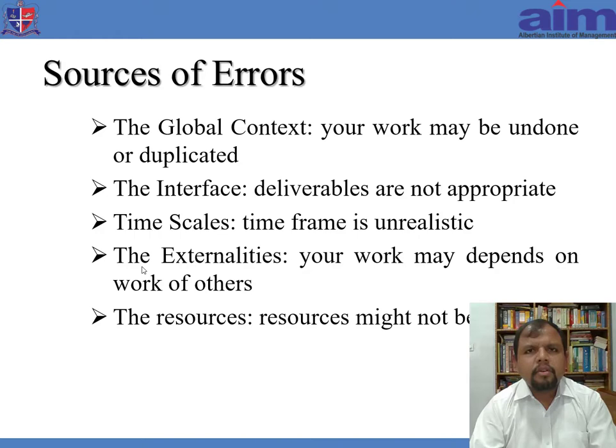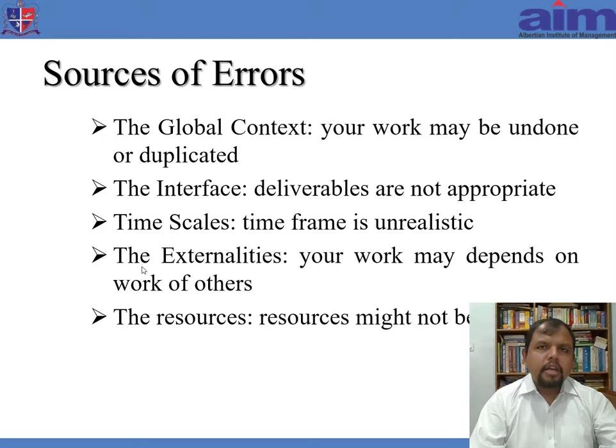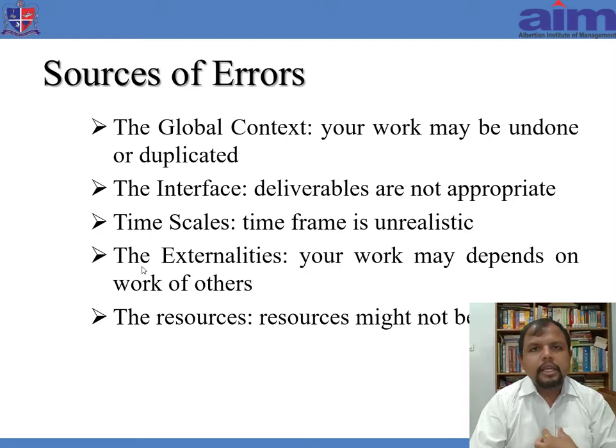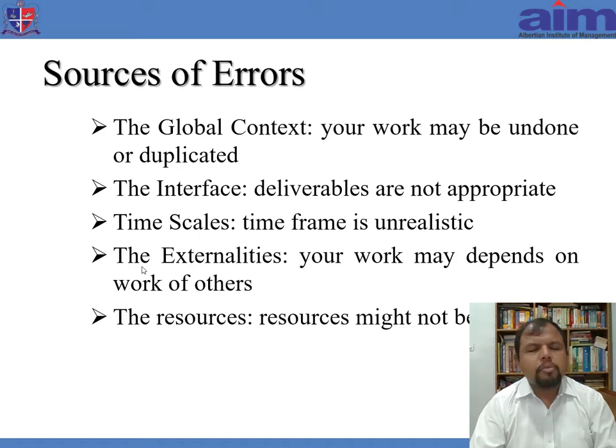Externalities are another source of error — my work might be dependent on the work of others. I should be very clear that unless they complete their work and give it to me, I won't be able to start. Unless I communicate it properly, if they're not giving it to me on time, there will automatically be a delay in my project. Resources are again another source of error — the resources might not be available. Resources could be human, capital, energy, entrepreneurship, management, or time. They might not be available.